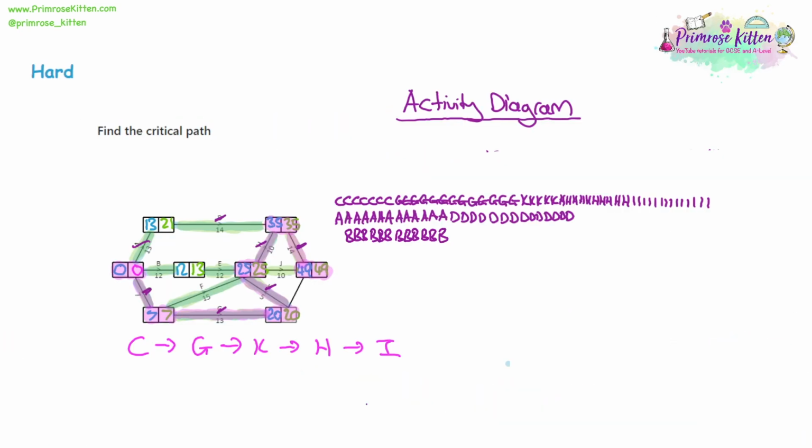Now you want to avoid doing that. Could have done that with A as well and left a gap of 7 at the start if they ever wanted to. But you're trying to fit all the time in efficiently, so usually doing that's not going to be helpful. And since B is the last one I'm doing towards the start, then I know I can actually put it a little bit later if I need to. Then we've got E, there's 12 of those.